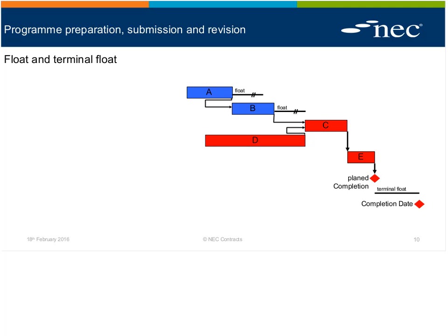You're right, though. If you submit a program when instructed by the project manager, no less frequently than the interval stated in contract data, but also whenever you want as a contractor. Yeah. And the reason for that is maybe to demonstrate that first past the post principle. Yeah. I've used that float. You can't. Float's gone. Float's gone. Yeah. Okay.